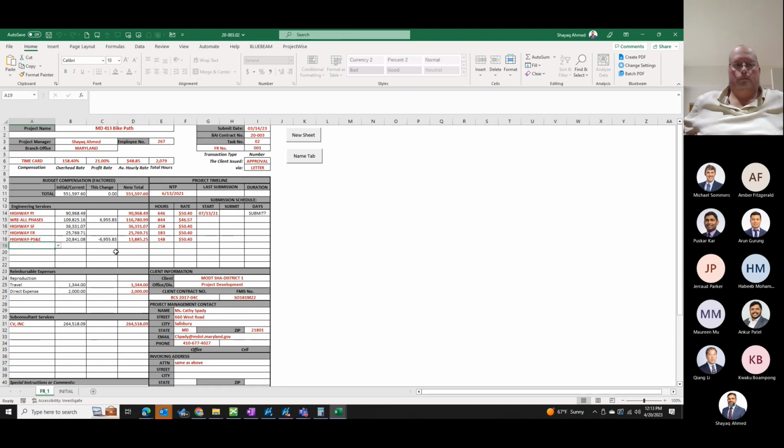You can also take that a bit further, which is what Micah has on the screen here, where you're breaking it up by milestone submission. So this is a DGS project, I think. The ones that are labeled DD, that's design development, the first submission in any DGS project. So this one has a roadway budget, a structure budget, a water resources budget.